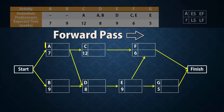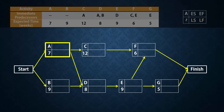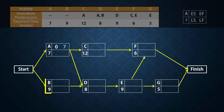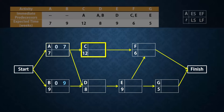Let's do the forward pass. A has no predecessor, so its earliest start time will be 0, or right away. Since it has 7 weeks to be completed, its earliest finish time will be 0 plus 7, which gives 7. B also has an earliest start time of 0, and with an activity time of 9, it will have an earliest finish time of 9. Now C needs A to be completed before it can start. Since the earliest finish time for A is 7, the earliest time C can start is 7. And with an activity time of 12 weeks, C will have an earliest finish time of 12 plus 7, which gives 19.